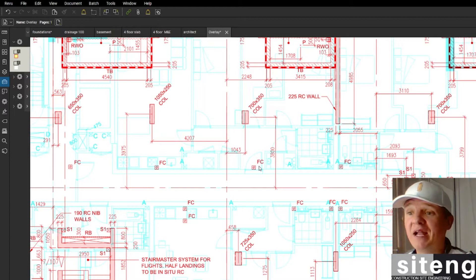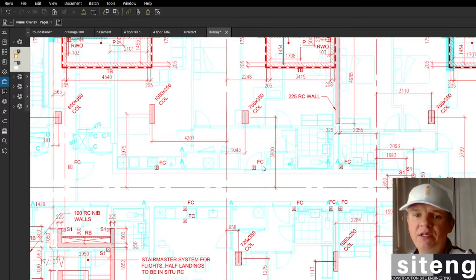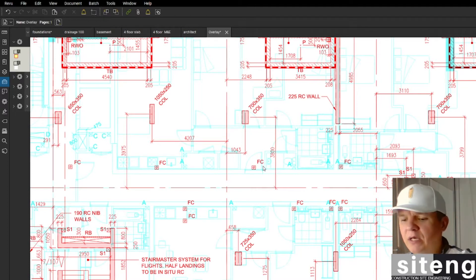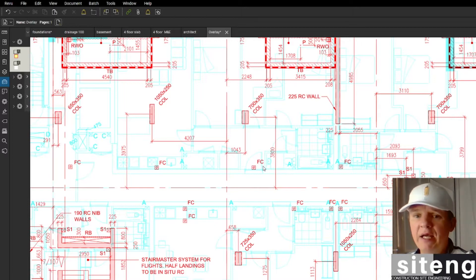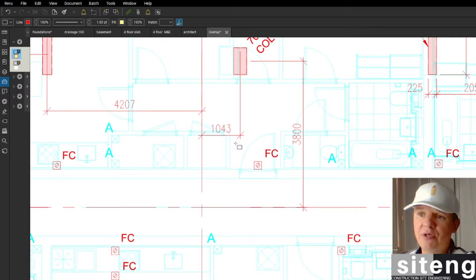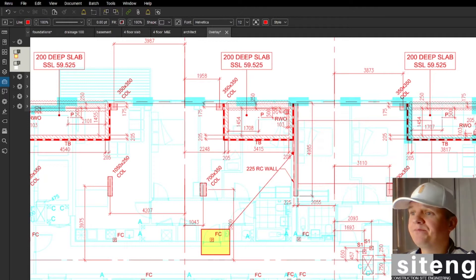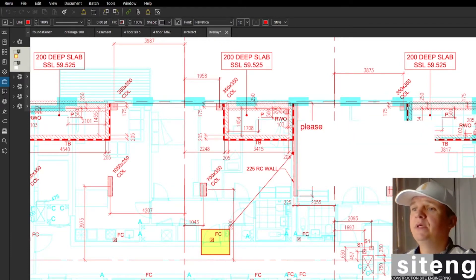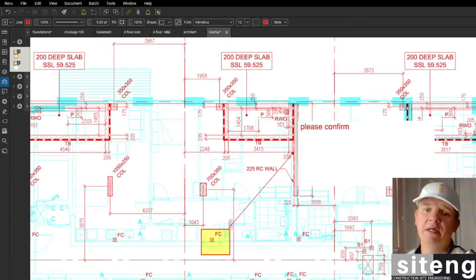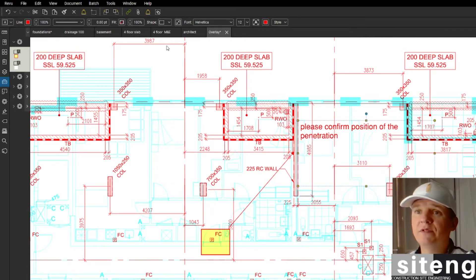This RFI is an example of what we would do if we had information like this and how we would raise an RFI if needed. What I would typically do — because the language of the engineer is the drawing — is always attach the drawing to the RFI. I'll take this one, mark just one penetration, and ask: please confirm position of the penetration.